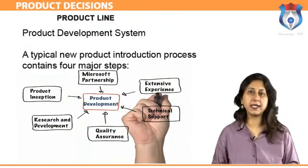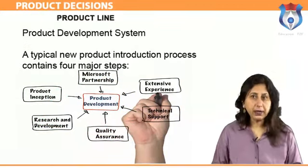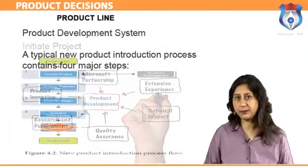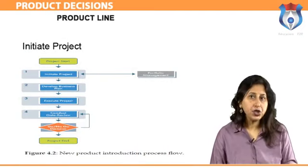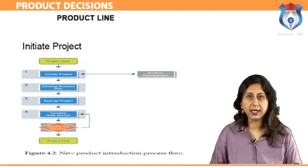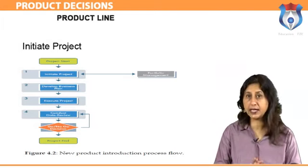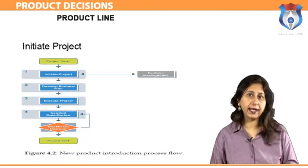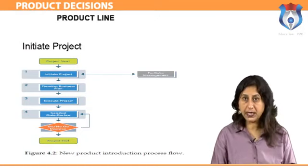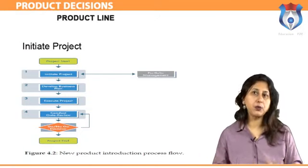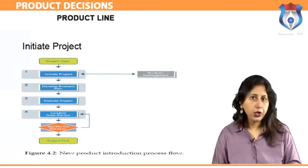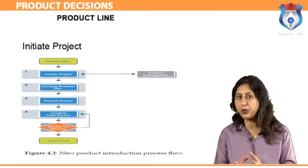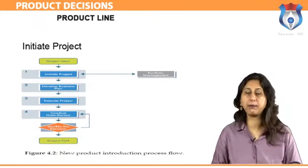A typical new product introduction process contains four major steps. Step 1 — Initiate project: the initial step of the NPD process is to properly start and manage the project and its deliverables. An initial project plan is developed from a template based on best practices and benchmark data. Resource planning and trade-off studies are performed to identify potential outsource and offshore development opportunities.